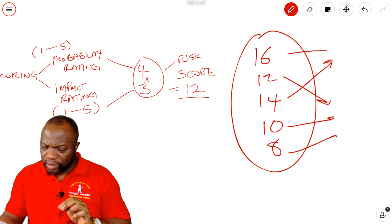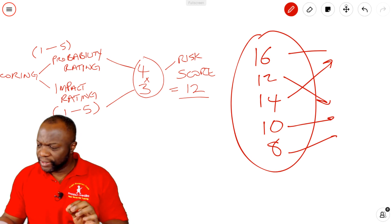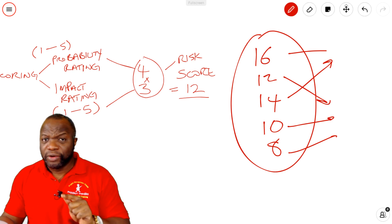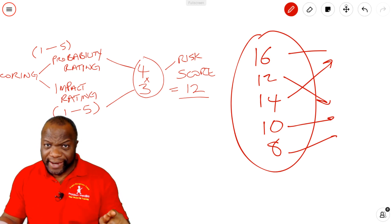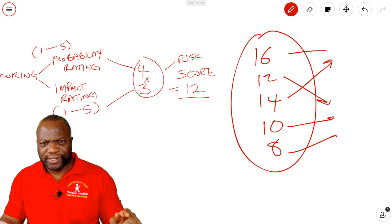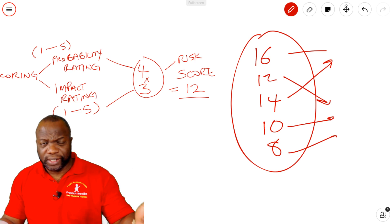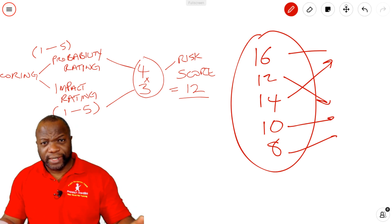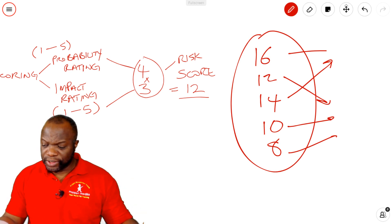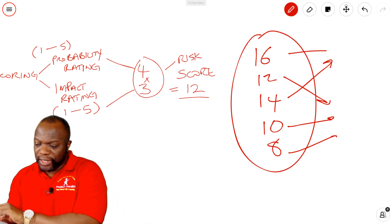Let's read page 419. It says, perform qualitative risk analysis is the process of prioritizing individual project risks for further analysis. That further analysis is what we will do in the other processes such as quantitative, perform quantitative risk analysis, plan risk responses and so on. The key benefit of this process is that it focuses on high priority risks.